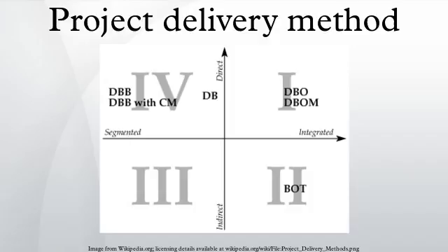Design build or design construct. An owner develops a conceptual plan for a project, then solicits bids from joint ventures of architects and/or engineers and builders for the design and construction of the project.